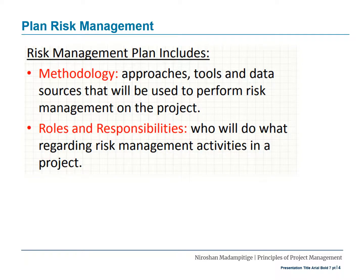Your risk management plan includes the methodology, approaches, tools, and data sources that will be used to perform risk management on the project. It also includes roles and responsibilities — who will do what regarding risk management activities in a project. Some teams overlook this area and run into problems at a later stage of the project, so ensure you define your roles and responsibilities while you plan your risk management process.